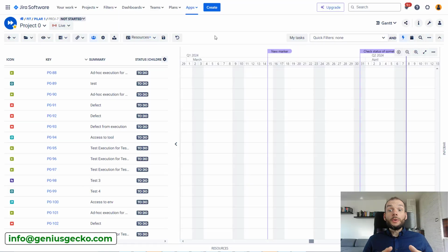Let's start this video by going over the changes available in the Gantt module. So first one is regarding the dates. In the past, when you added a new ticket to the box and this ticket did not have any start and end date, BigPicture automatically filled those. So basically the tickets appeared in the Gantt module. Now this is not the case.